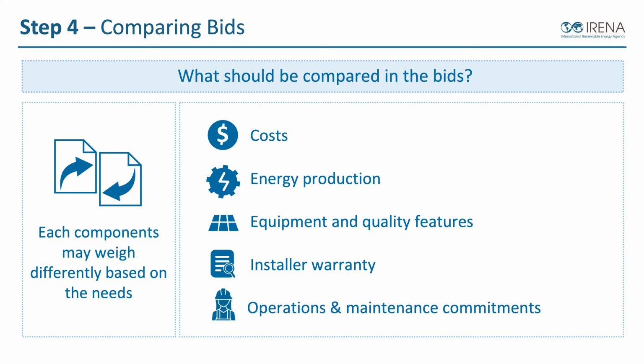So let's say, anytime we're doing work like this, especially the more expensive a project gets, we really want to be comparing bids. In developed solar markets, it's going to be easy to get 2, 3, 4 bids that we would want to compare across. In new solar markets, that might be challenging. If there's a new solar market where there's just not that many solar contractors working yet, we're going to have to try our best to get at least 2 bids to compare across.